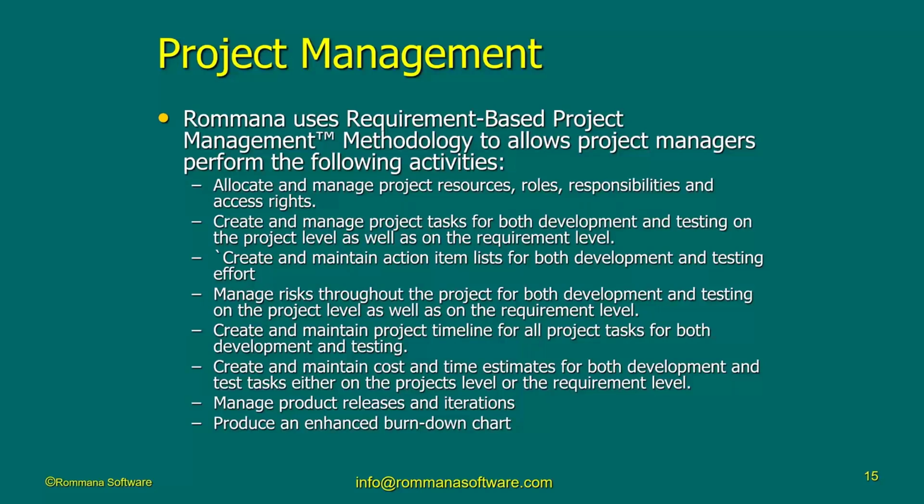Is the feature. So all that your customers care about are the features that you are going to be delivering. So as a result, you need to phrase everything in terms of features. Even when you come to speak about timeline and what's going to be delivered when, or when a feature or a user story or requirement is being changed, then you need to see the impact of this on the timeline. Cost estimation, time estimation, they're all done in terms of user story or requirements.